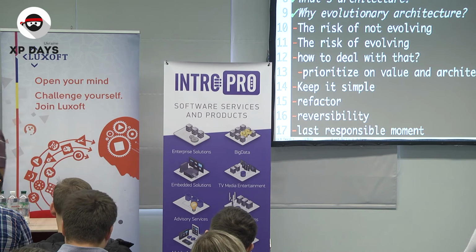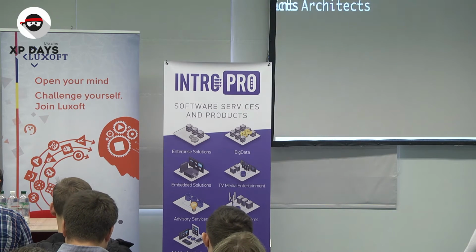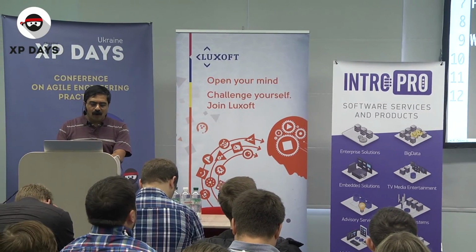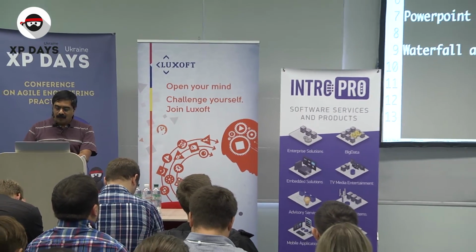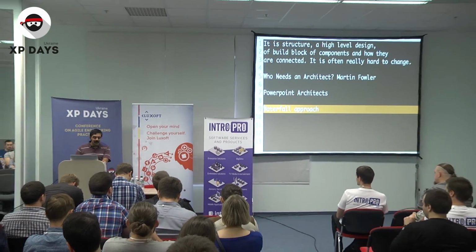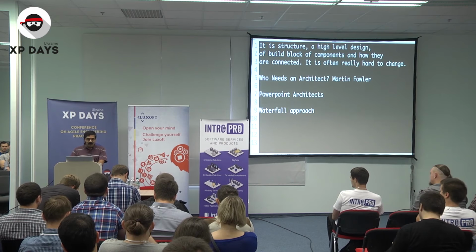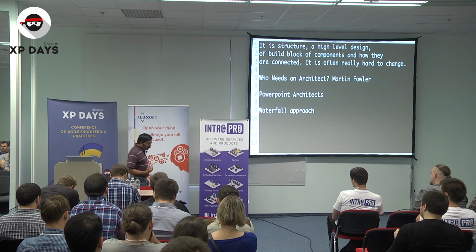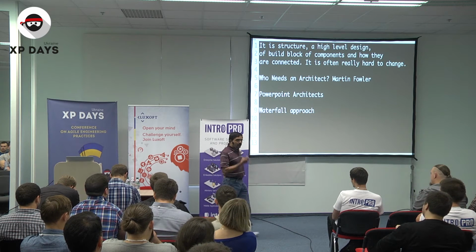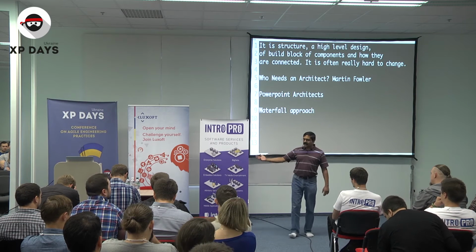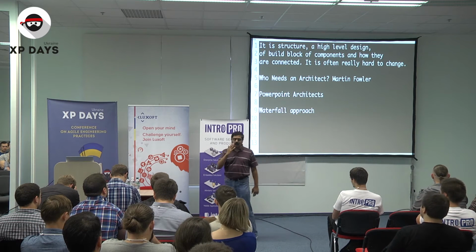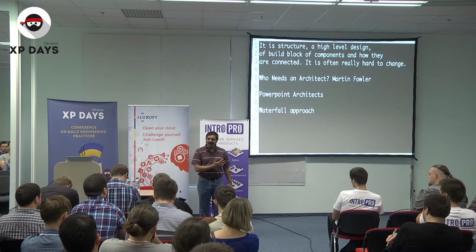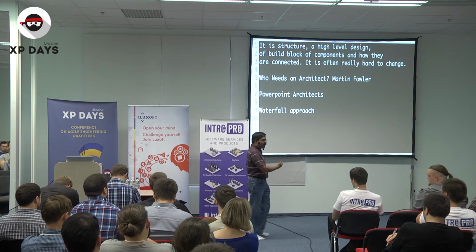Now, one of the problems we have gotten into over time is this interesting mess we are in today. If you look back in time, we did what is called the waterfall approach, and we did this for a long time. We do this today, except we call it agile. But most of us still do this, right? What was really wrong with the waterfall approach? I would say the main problem is this: you are doing things in a sequential order, and by the time you get to the interesting parts where there is high risk, you have walked too long in one direction.